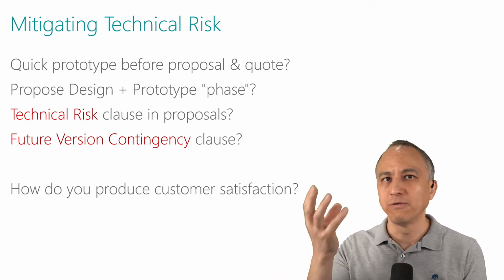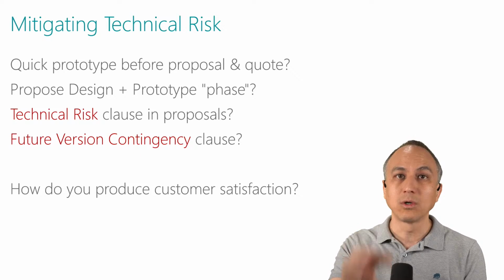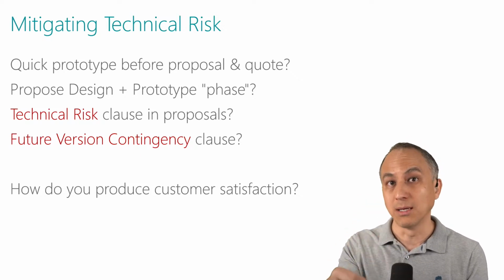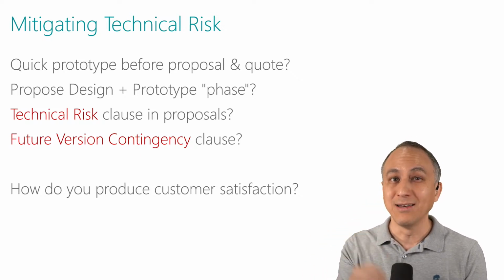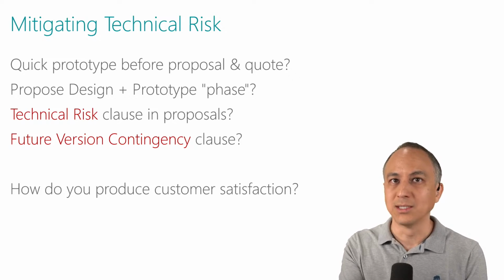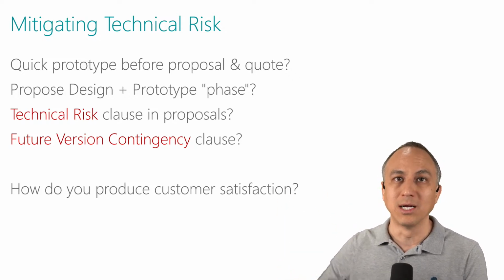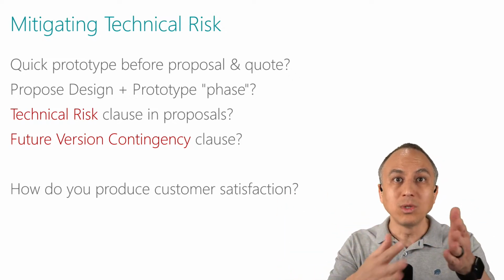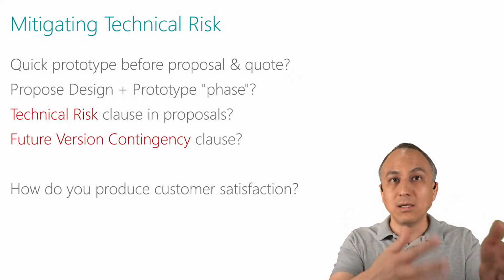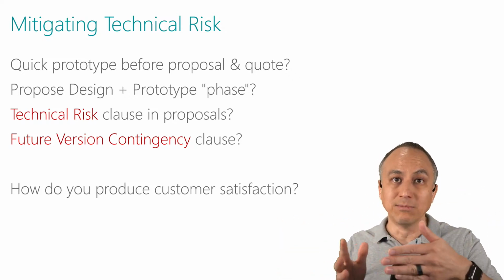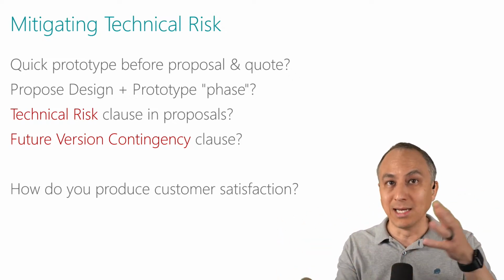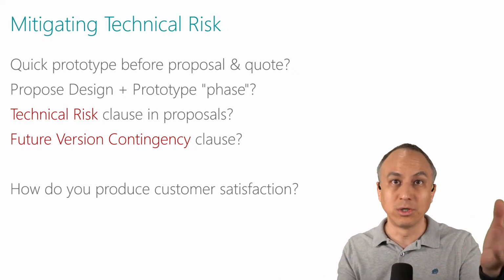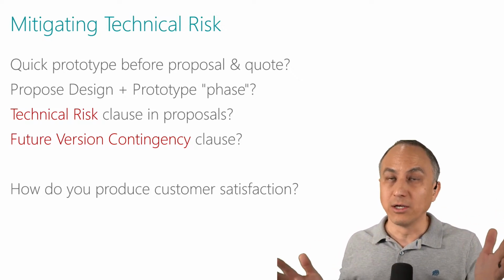So before we quote you for actually delivering, we will quote you to design and prototype this solution. Now, I would typically not do this with an 8-hour project. This is more on the 40+ hour projects where you're like, well, we have some known technical risk here. We need to prototype these key items and prove that these things work and identify the issues, because there will certainly be issues.